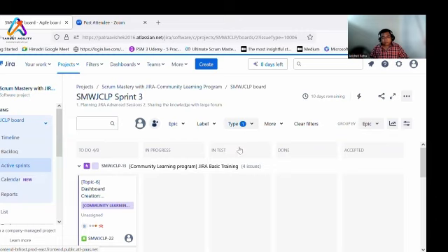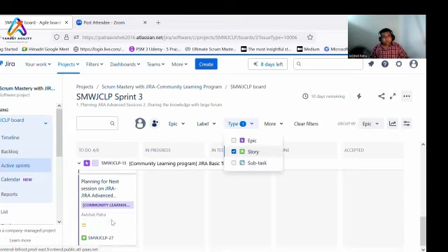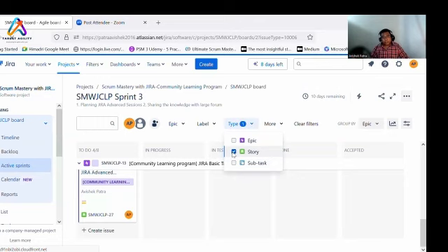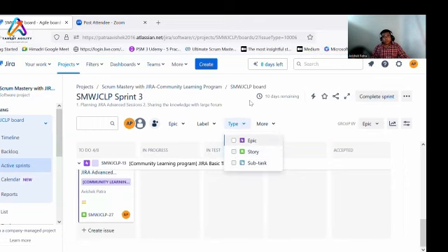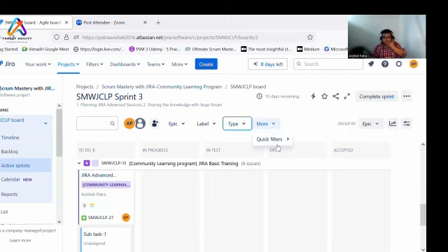And then it will only show the issue type story in the board, right? And then you can have quick filters in place. As I've shown you, write your JQL query, in progress of Abhishek. If that is a filter, it will show only Abhishek's tickets that are in progress. So you can definitely use more and more filters to customize your visualization of the data and talk to the team members in case it is required.